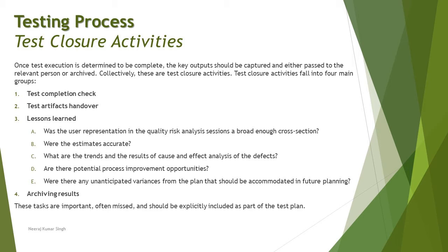The second important activity is test artifact handover. The moment you complete your activities, the next thing is the maintenance of the product, and the maintenance team will take care of it. So the maintenance team should be aware of what exactly you used as a part of the test artifacts, including the test data, test cases, test environment, test infrastructure, the test conditions, the techniques, approaches, and the test tools. No matter what you have used in order to finally complete or validate this particular product, it should be shared with the maintenance team.